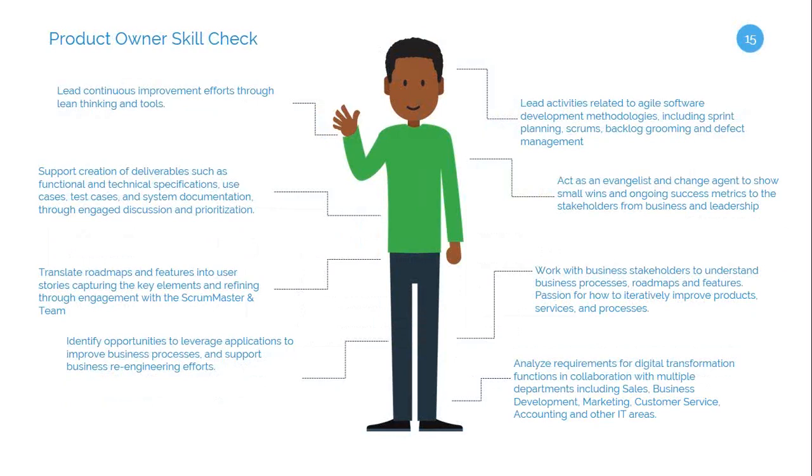If the Scrum team has made estimates, and historically over 2 to 3 or more sprints those are not panning out, they're not proving to be accurate, for sure that's something the product owner needs to know very quickly so that we can react and get them the information, the visibility, the visualization, so that they can actively predict when things will be ready.